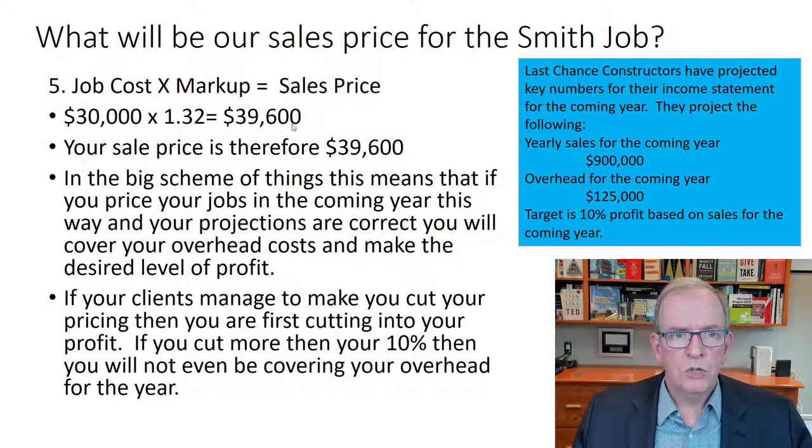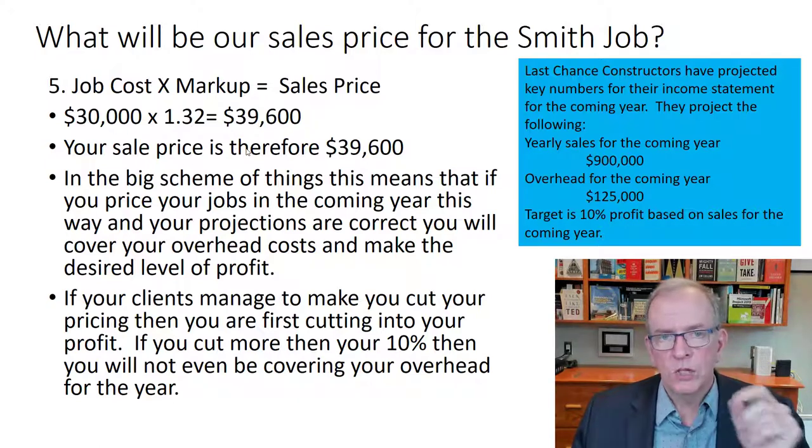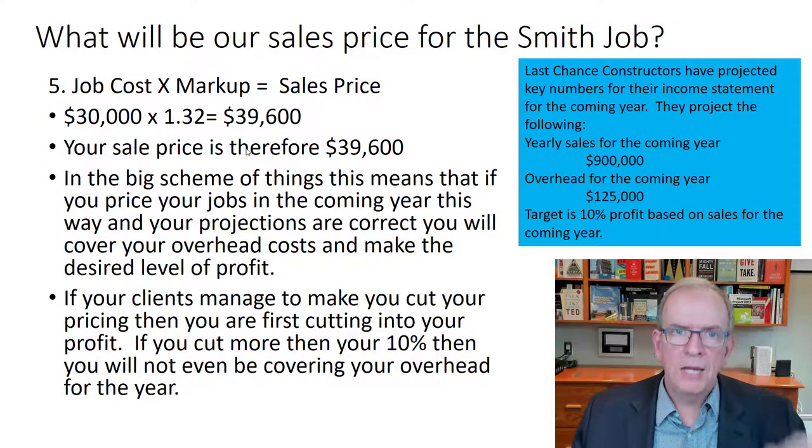So you want to make sure that you've allocated enough for your profit, not to mention in that direct job cost amount, you should have had an allocation for management contingencies and for project contingencies that would occur. One is for the unknowns that occur, and the other is for just little variations that you would have. So you also want to make sure of that part, that's in your costing as well, because nothing goes exactly as planned. We've mentioned the planning fallacy. You have to be conscious of that.